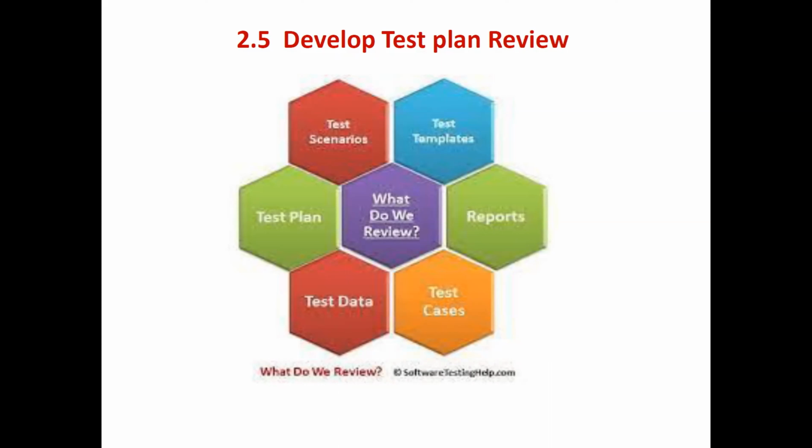And for your proposed model and methodology, techniques that are more efficient than the existing one, you will identify the software and hardware requirements. Then you will go for the diagrammatic design of your proposed model. Then you will go for implementation, then testing, and stating the results, publishing. So like that, there are some stages. So we'll create a project plan. Out of 6 months, the first month maybe for analysis, second month for design, third month for implementation, fourth month for testing, fifth one for documentation.